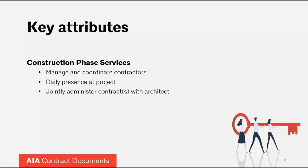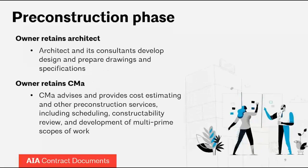In the construction phase, the CM as advisor is going to manage and coordinate the contracts. Oftentimes this delivery model is used when you have multiple prime contracts and multiple trade contractors. The CM as advisor is going to have daily presence on the project — not just occasional site visits as the architect or engineers might do. Under normal circumstances, the CMA will have a presence at a job trailer on site so they can handle issues in real time. They are going to jointly administer the contract — either the general contract or multiple trade contracts — along with the architect.